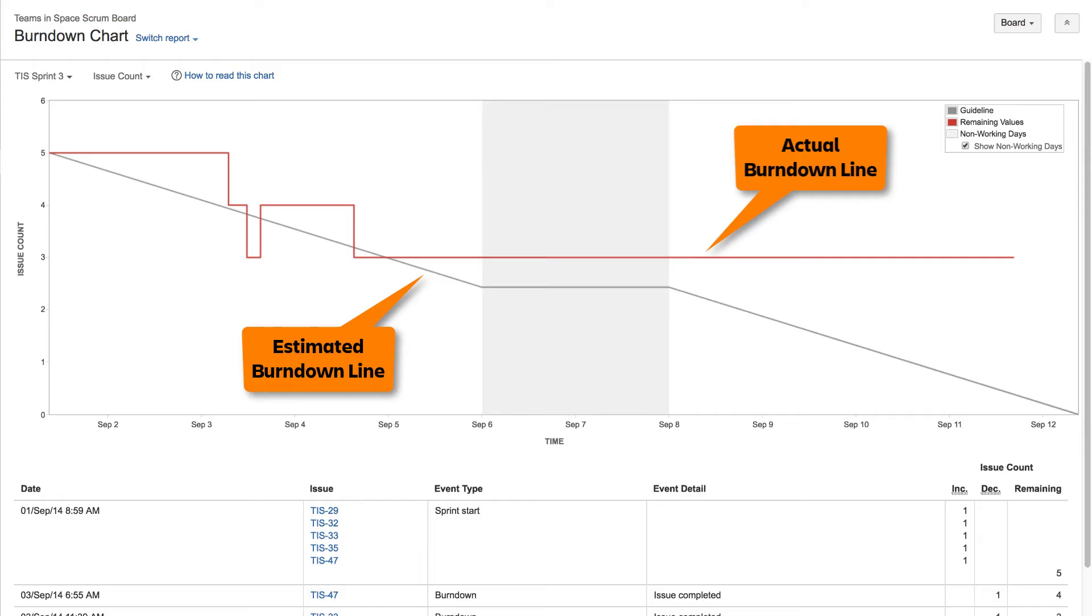These two lines will never overlap perfectly, because one is an estimate and the other is actual. However, if they meet at the end of the sprint, then the scrum team met its predicted goal for the sprint.